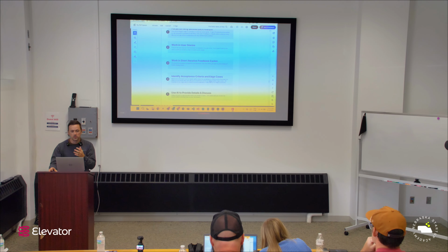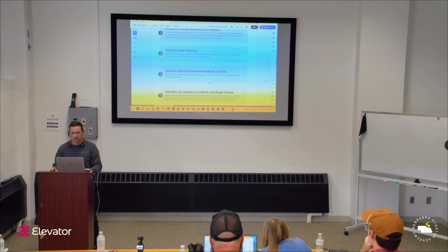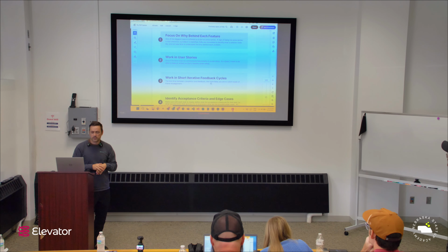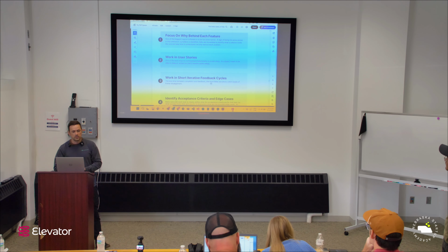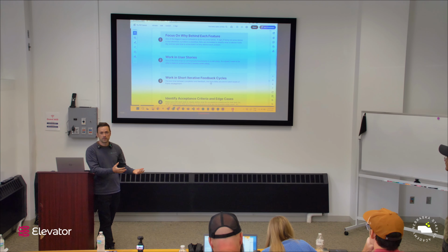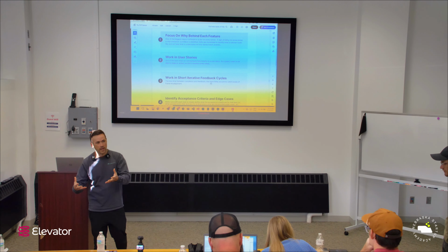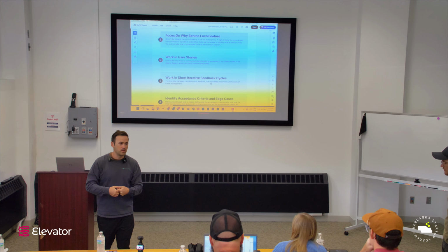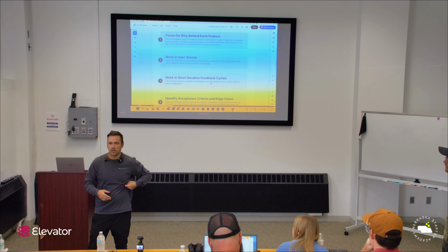Next one is to work in user stories. I'm not sure if you're familiar with user stories. This is probably harder to read, but a user story is: as a X, I want to be able to take this action so that I receive some value. So as a plumber, I want to be able to log on to the app and see all of my components so that I can select the component that I purchased for my customers.